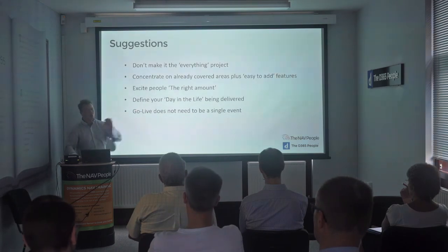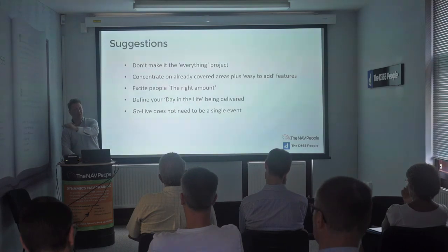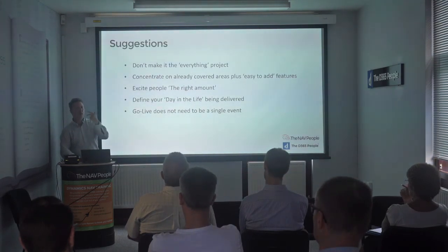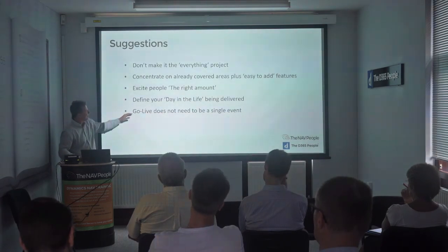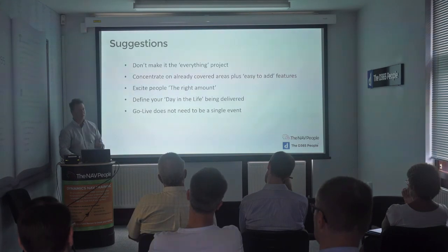Define what your day in the life is. What are your business processes? Make sure that you can say, well, this is how we do sales to cash. This is how we do non-stop purchasing, so that you can test those things in the new system way before you go live. And bear in mind, the go live doesn't need to be a single event.